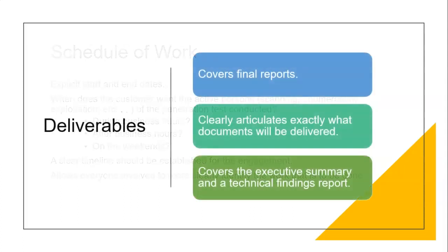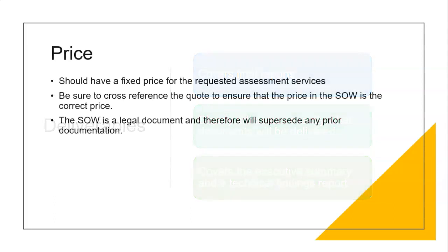The deliverables. Now, when we talk about the deliverables, we're talking about what the customer can expect to receive at the end of the engagement. This covers the final reports. It clearly articulates what documents will be delivered. This also covers the executive summary and the technical findings report. Pricing. You should have a fixed price for the requested assessment services. Be sure to cross-reference the quote to ensure that the price in the statement of work is the correct price. The statement of work is a legal document and therefore will supersede any prior documentation.